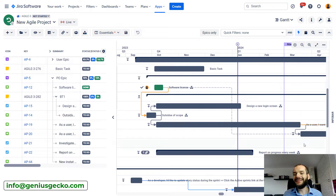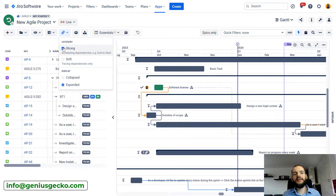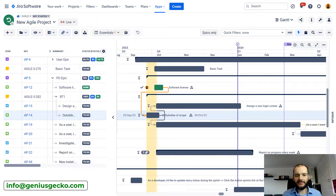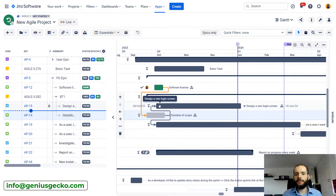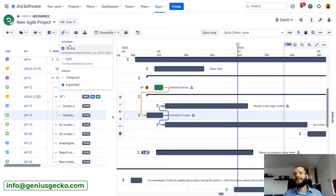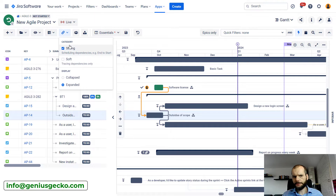Soft dependencies never cause the dependent task to be moved on the timeline. On the other hand, strong dependencies are the default dependencies for the Gantt chart, and they might force other tasks to be moved. So if you delay the end date of a task, you'll see that some other tasks that have a dependency with this one will be pushed on the timeline. Strong dependencies are a bit more complex — we'll be focusing on them, but most of the features discussed cover both categories.